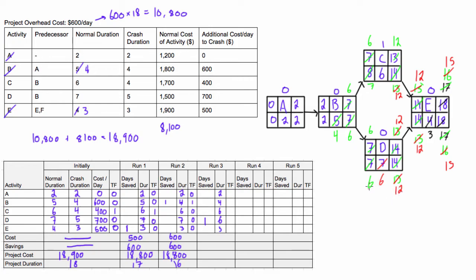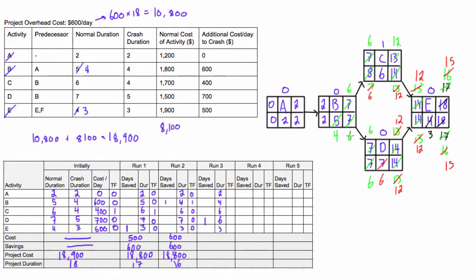So we have 12 minus 6. Well, there you go. 12 minus 6 is 6. And again, remember, we just changed the duration. We didn't change anything about the start of this. So that's important to notice. So now we also have we have 12 minus 6. We're gonna change that guy. So now this one's late start will be 6. And then looking here for the late finish of this, we can either bring in a 6 or a 6 or we're not gonna change anything there.